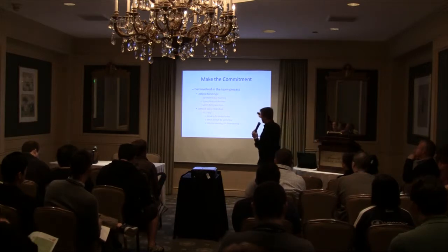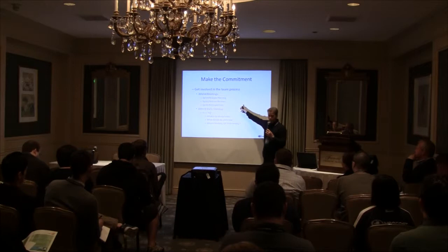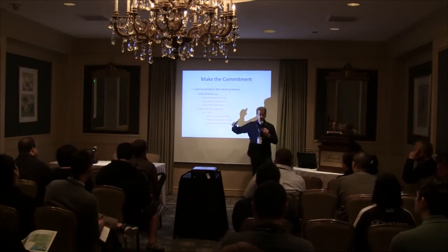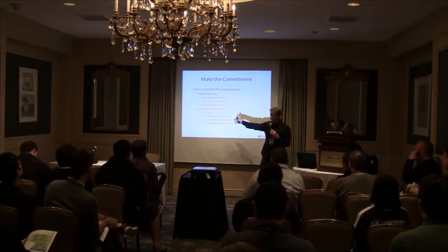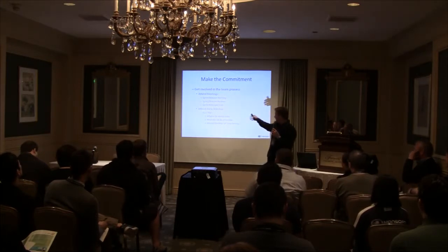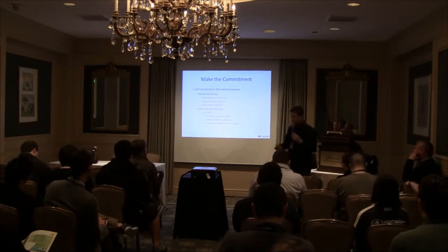So as a committed member of the team, embedded QA lead at least, preferably the QA testers that are embedded, you need to be there and be a pig. You need to be committed and talking about what are you doing today, what did you do yesterday, and what's blocking you from testing the product.